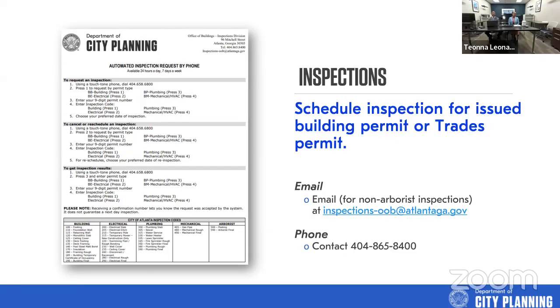You can hire a third-party inspections company to conduct your inspections for you if you want to do them in a more timely, sequential manner, having someone inspect right away. Our inspections are scheduled and must be done within 48 business hours. So once you schedule an inspection, within 2 days you'll have an inspection scheduled for you, and you can do that at that time.